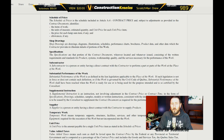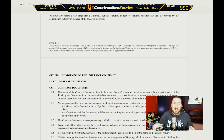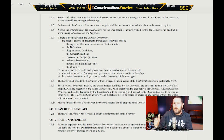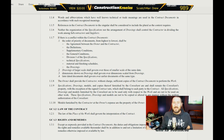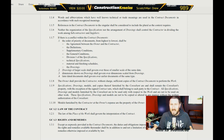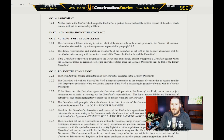In a contract like this, there'll be a holdback on all your checks, on all your progress payments, in case there's a lien period. Until the lien period runs out or substantial performance is completed, then you will get your holdback. You've got to understand that when you're building something, other trades have to come in and the project could last a long time. You can't wait two years to get paid. So your portion of the work will be tested and completed at a certain point. Substantial completion is like when you're about 70 to 80% done your portion of the work; then you're going to start thinking about substantial performance — which is when your equipment or your things have been up and running and tested, and then they could be signed off. It's important to know when to get paid.